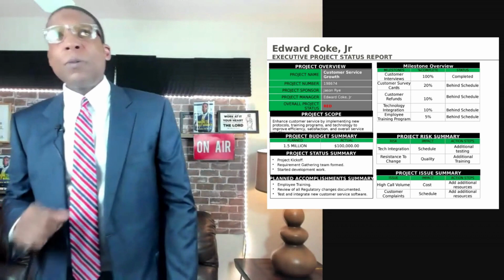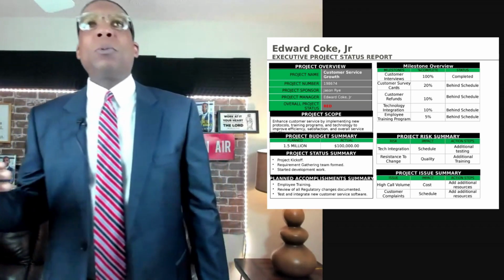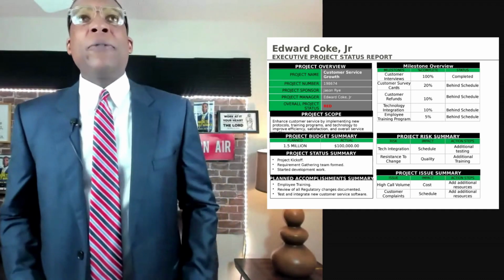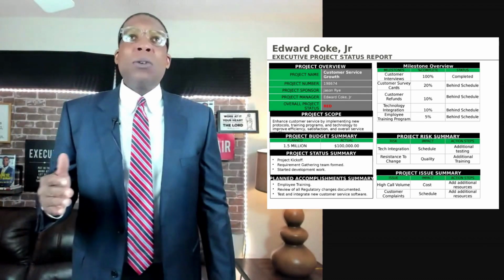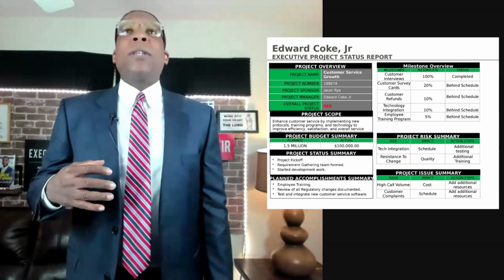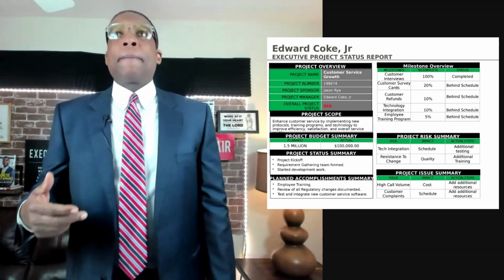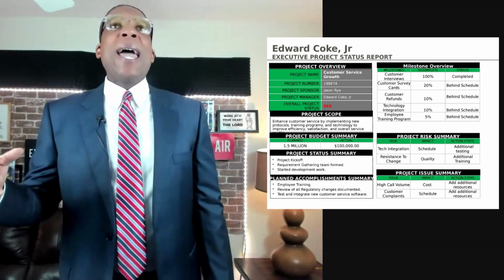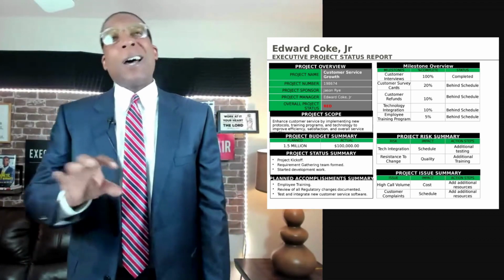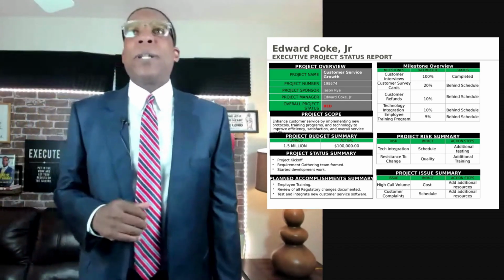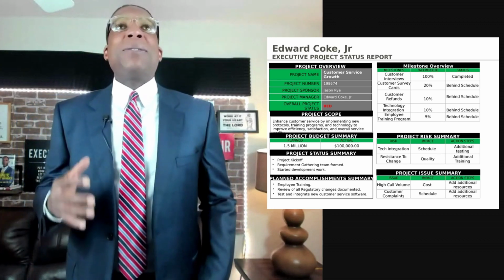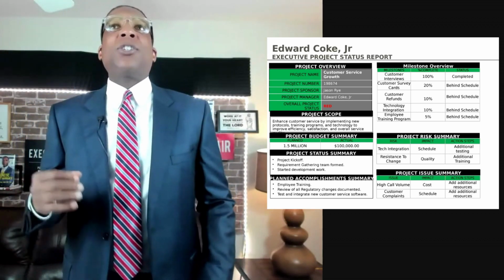Now, this is huge. Sometimes people confuse milestones and tasks. A milestone is a significant point in time, meaning a milestone is more of a high level. I'll put it like this: out of all of these tasks, once we do all of these tasks, this particular milestone will be completed. I hope that helps a little bit. So for instance, once we get the customer interviews completed, that means all the tasks related to that should have been done.